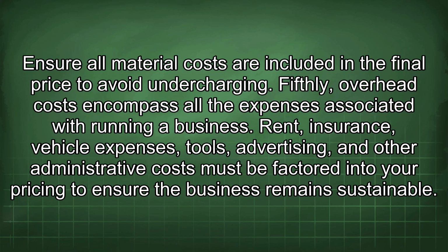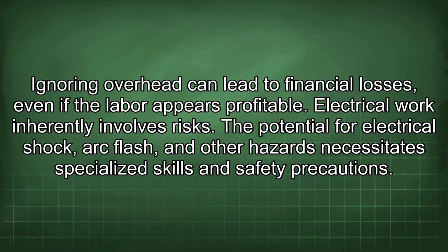Fifthly, overhead costs encompass all the expenses associated with running a business. Rent, insurance, vehicle expenses, tools, advertising, and other administrative costs must be factored into your pricing to ensure the business remains sustainable. Ignoring overhead can lead to financial losses, even if the labor appears profitable.